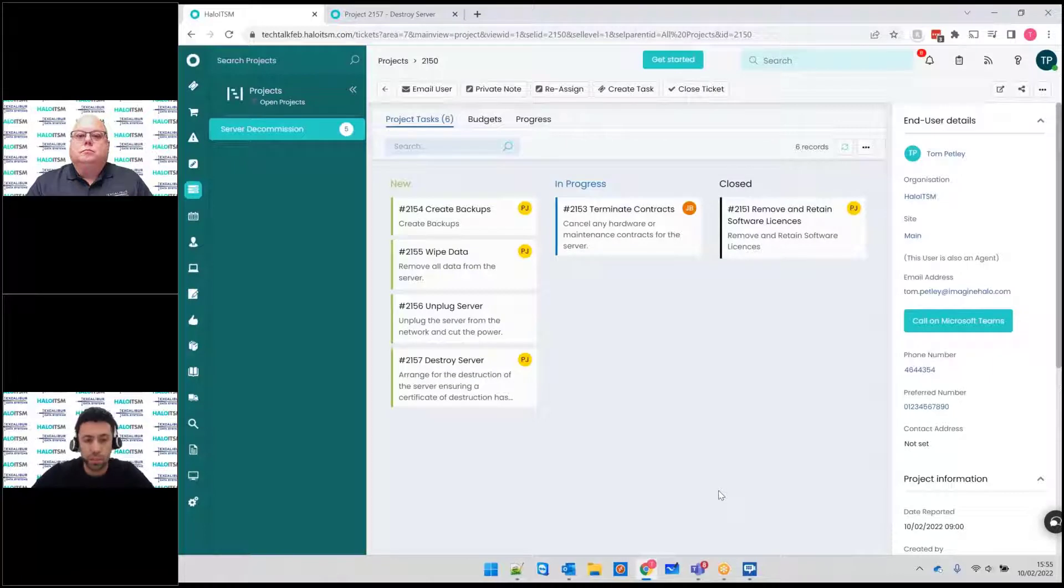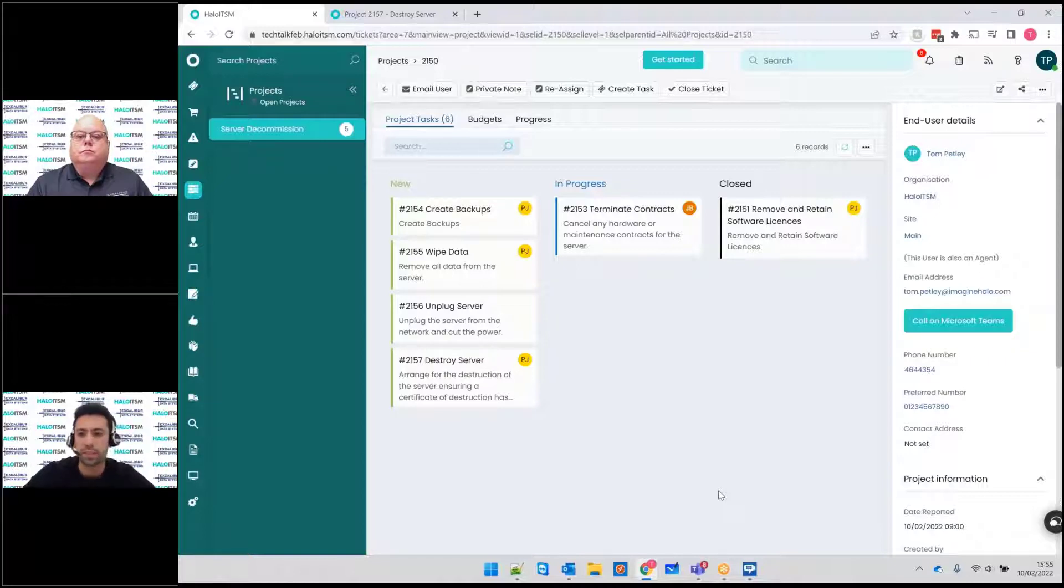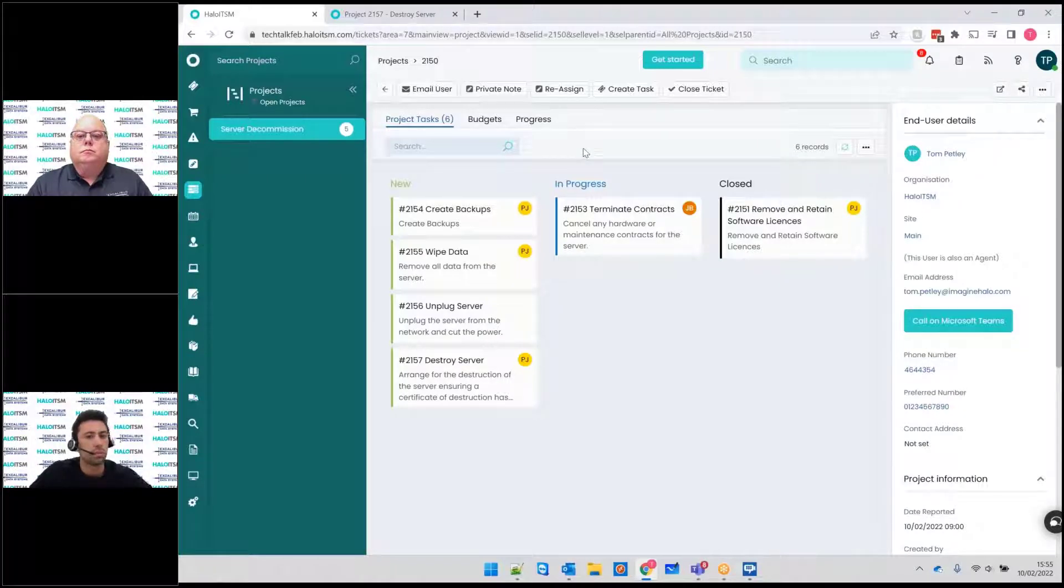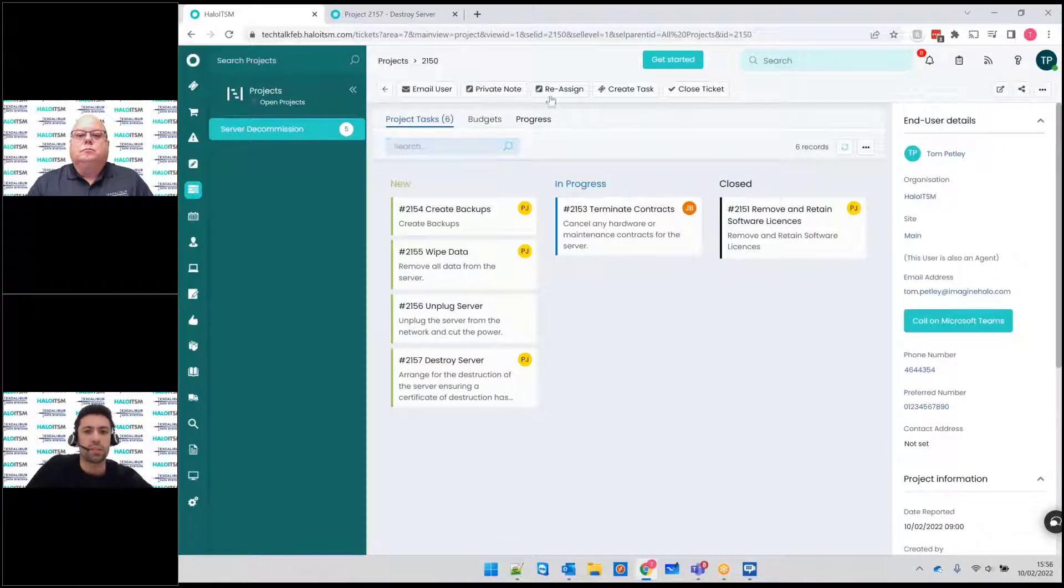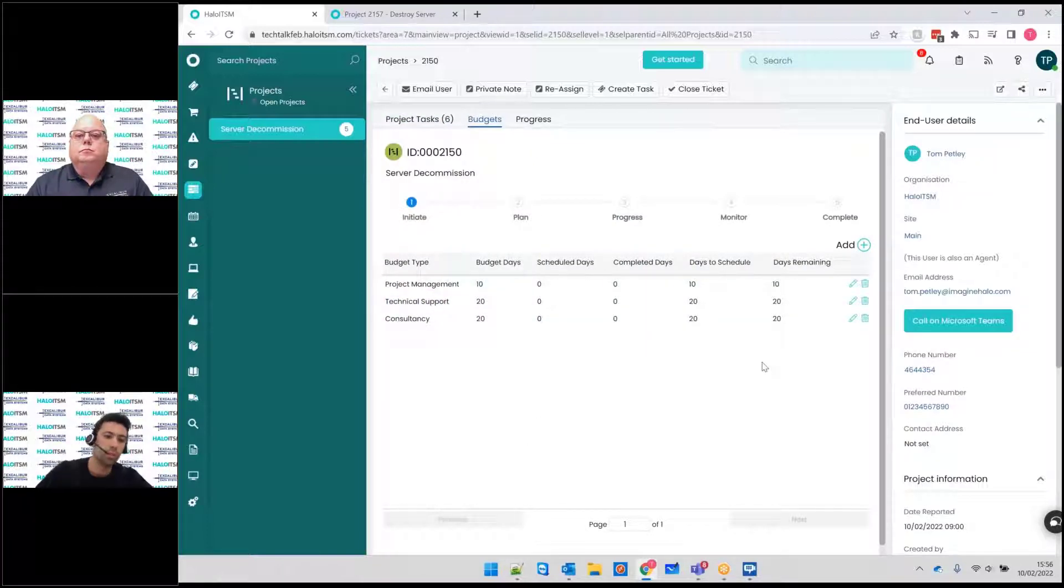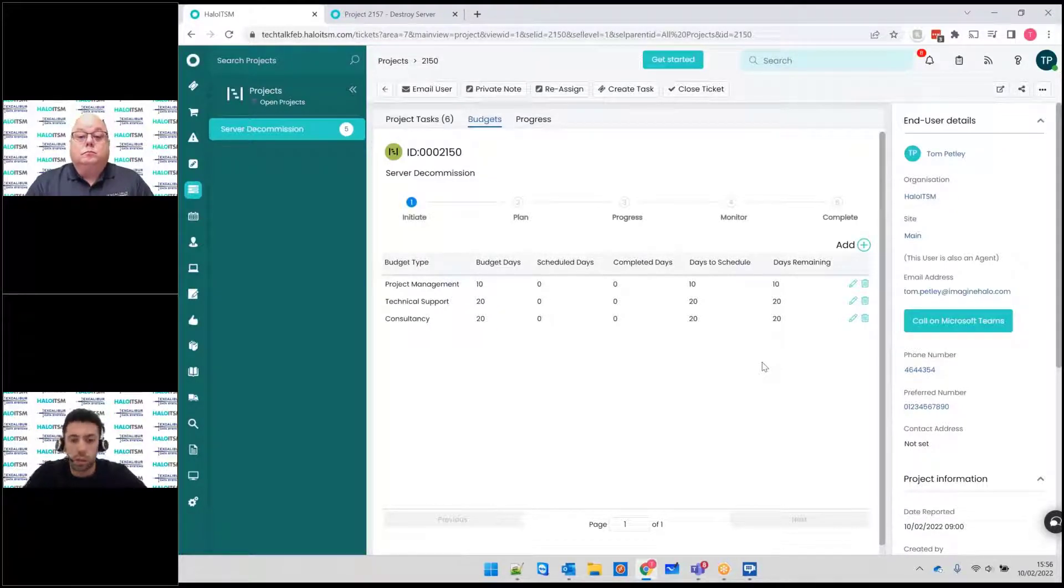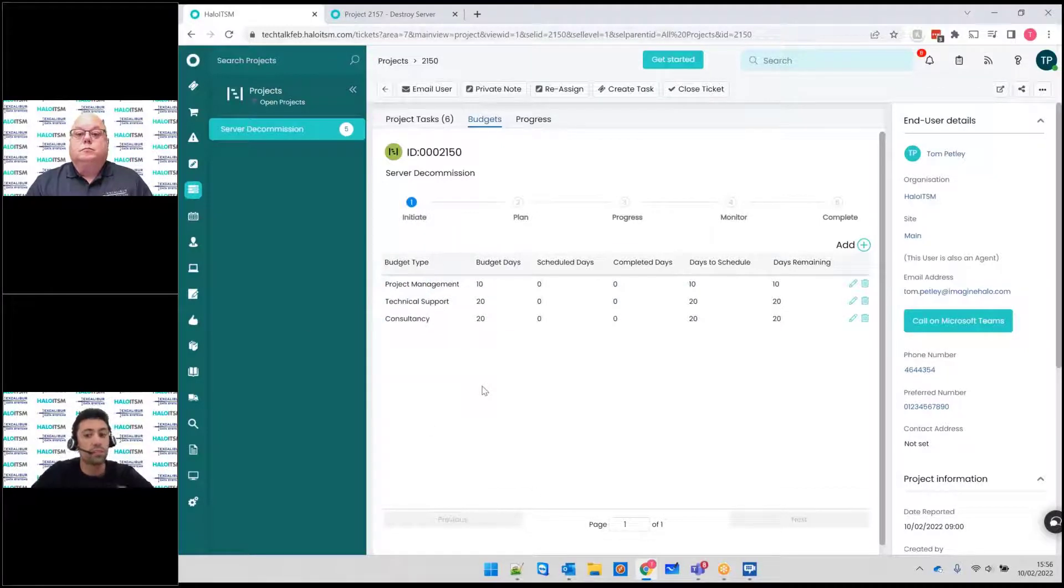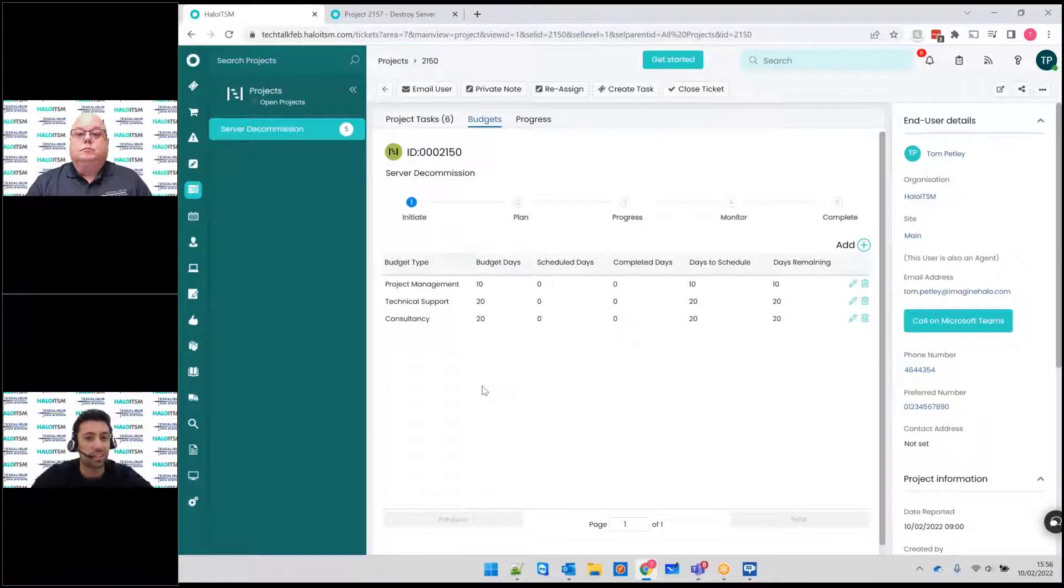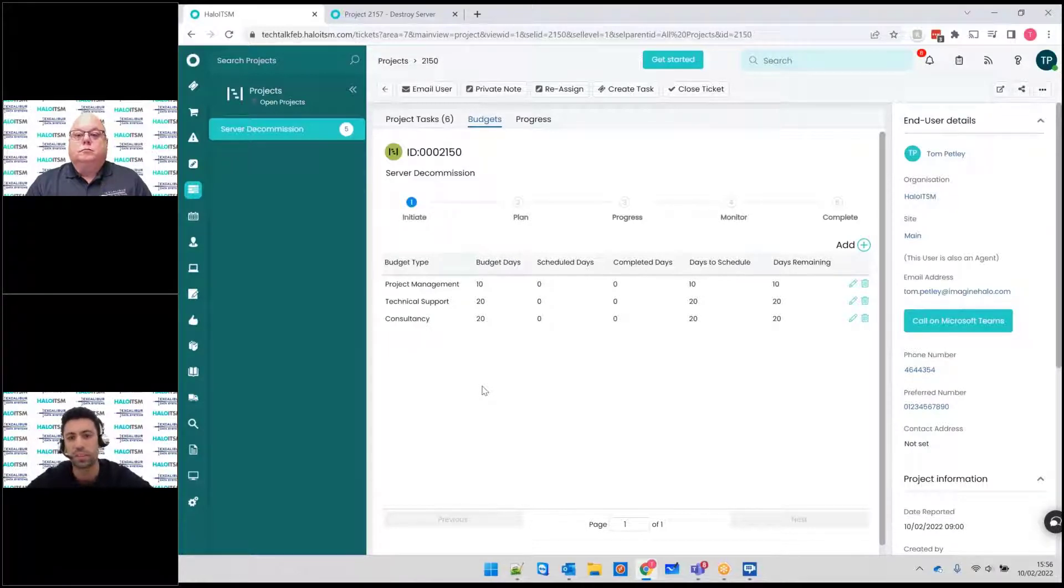And as it's within the ITSM solution, you can then transfer that visibility to anyone that you want to give the role to be able to access it. Just another interesting thing that is part of project management tools, but it's quite an advanced feature really, not all basic project management tools even offer this functionality, which is budgeting. So as part of a project you'll see here we've got our different stages, but we can actually assign budgets to them as well. So if you are managing a larger project, you might want to associate, we've got here a project management budget, technical support, consultancy, you can define your own budgets. And then each task can basically count down time out of that budget, and you can schedule time using the calendar functionality and the meeting functionality.